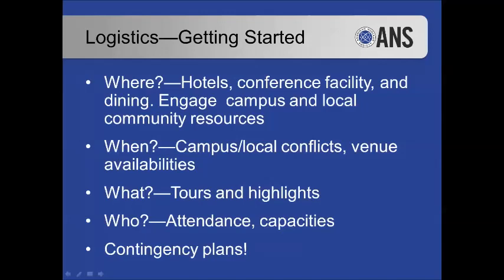The main motivator for this decision was so that the participating groups have a better chance of actually getting into their first choice of venues. A lot of these will actually start opening up bookings 12 to 18 months in advance. So we really wanted all of you who are submitting bids to be able to be successful in getting where you really wanted to be.